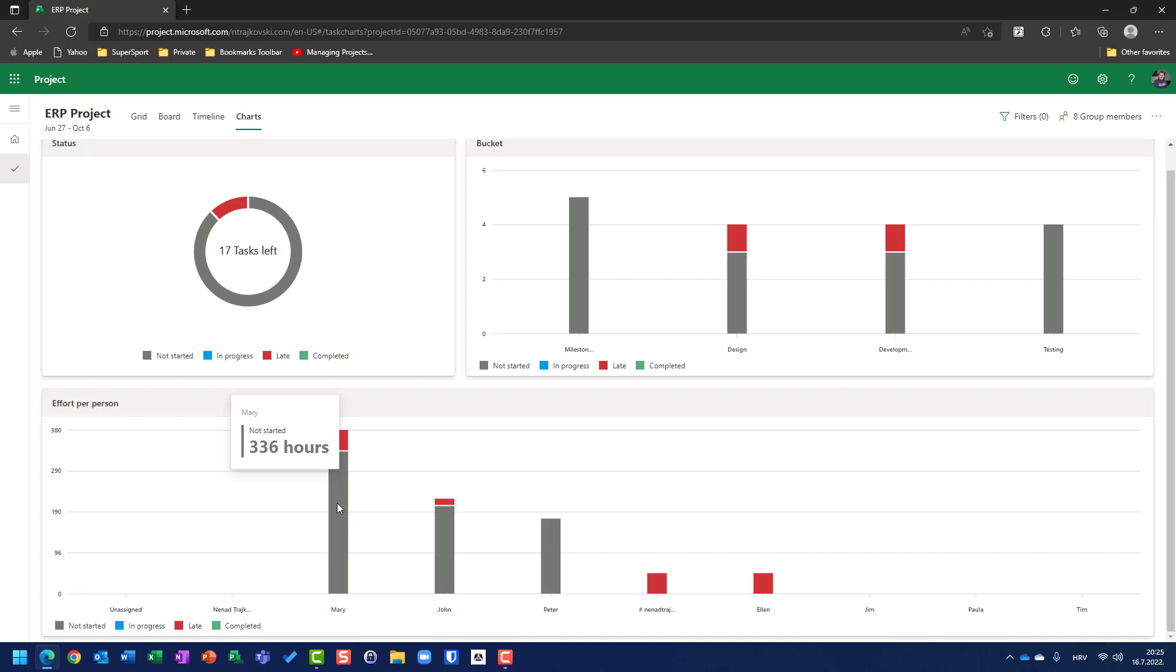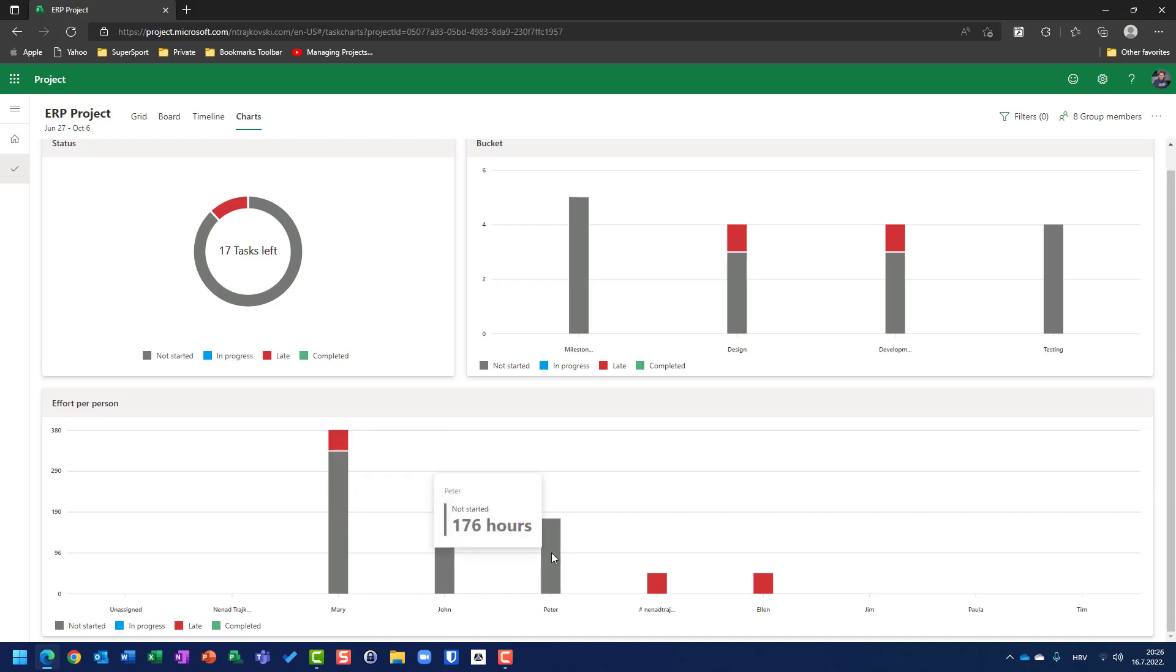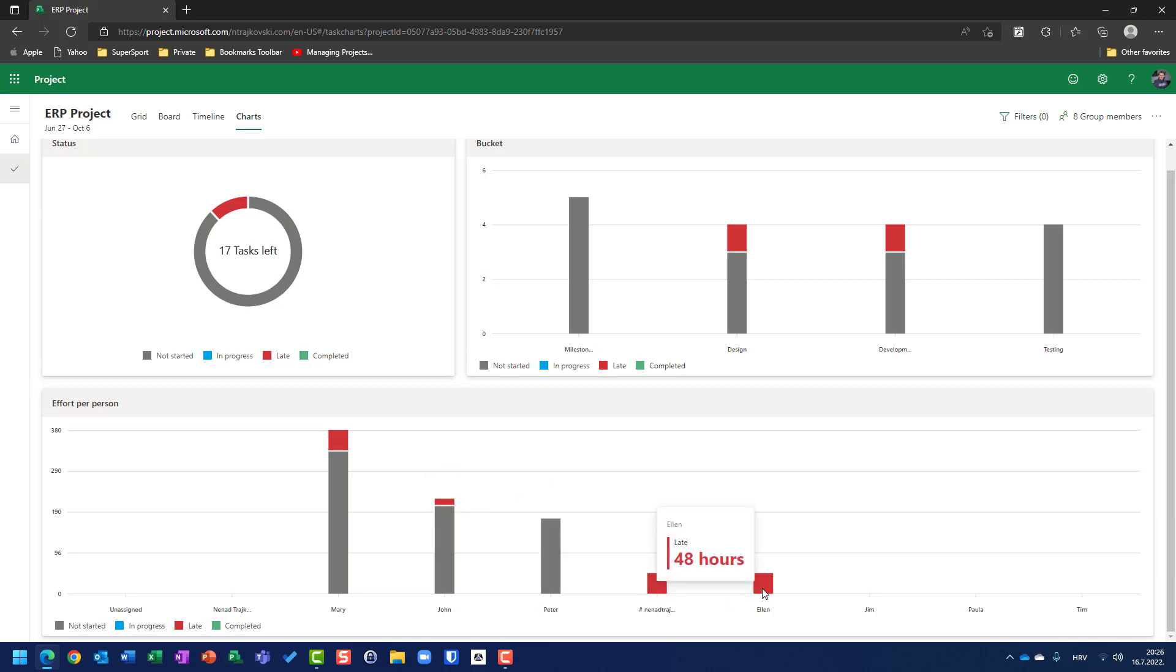And, you can see here, not started, 336 hours, 48 hours are late. Here, if I hover mouse, eight hours late for John, and 208 hours not started for him. Peter has 176 hours not started, Nenad has 48 hours late, and Alan has 48 hours late as well.